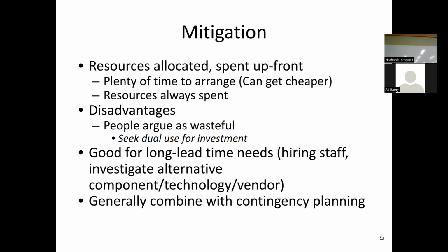But you should be thinking about contingency planning. Contingency planning is often lighter weight. You don't have to do something now, but you're all coordinated. If this happens, you will meet and you will do this, or you will enact something that doesn't even require me. So I want to see risk exposure, probability times loss, estimated, and I want to see mitigation. That's all for today.